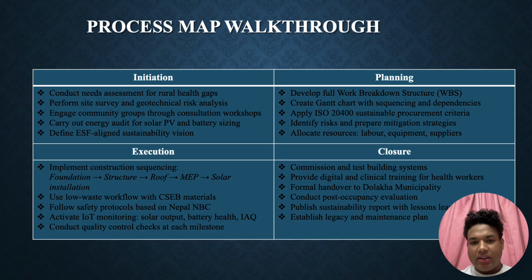Talking about the next phase, we have the execution phase. This phase involves construction sequencing, starting from the foundation to structure, roofing, MEP, and finally the solar installation. We adopted the low carbon CSEB construction method and followed Nepal NBC's safety standards.